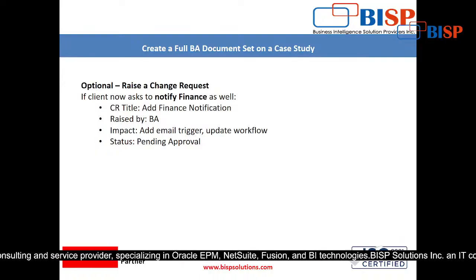Now after doing all this, it's again a time-consuming task to make these types of changes, because again the functional team has to put in the effort, and the technical team has to put in the effort. So that is why change requirements are very rarely entertained. There is a scope for change, but again time will be consumed and the deadline will move a little ahead.